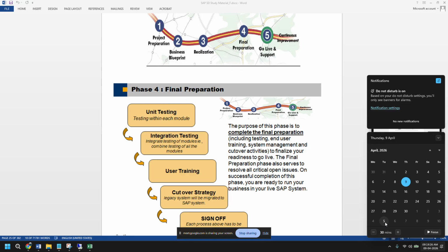So there is some dynamic data that you need to copy to SAP also. If you don't copy, what will happen? Nobody will know in SAP that there is an order lying in the old system from the 28th which is not completed yet. So this data you cannot migrate before, right? You cannot migrate this order which is coming on 28th on 1st of April, because at that time the order itself had not come.